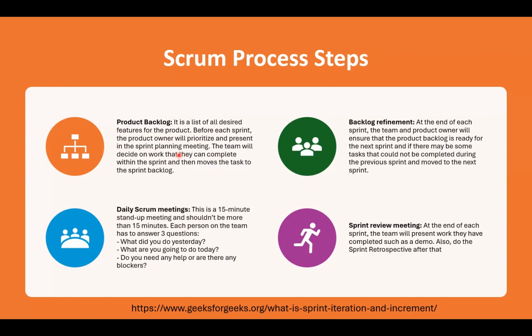Now, when you listen to the presentation from the guys, they are going to show you their own stuff as well, how they collaborate, the different stuff they want to do, their epics, their different tasks that they want to do for each of the sprints. Everything I'm saying is going to come to life when you see the real presentations that will be made when I finish this talk. So the team will decide on the work that they can complete within this sprint, 2 weeks or 4 weeks, and then the rest will stay in the backlog. So they take the ones they want to do, and then they start working on it.